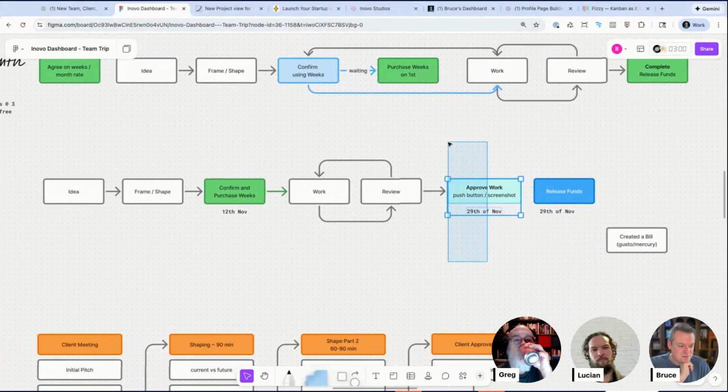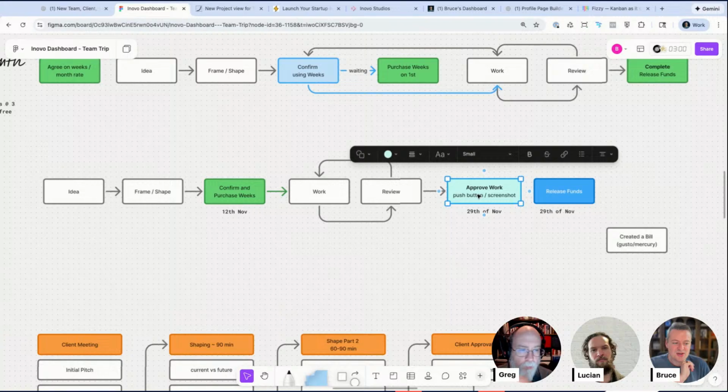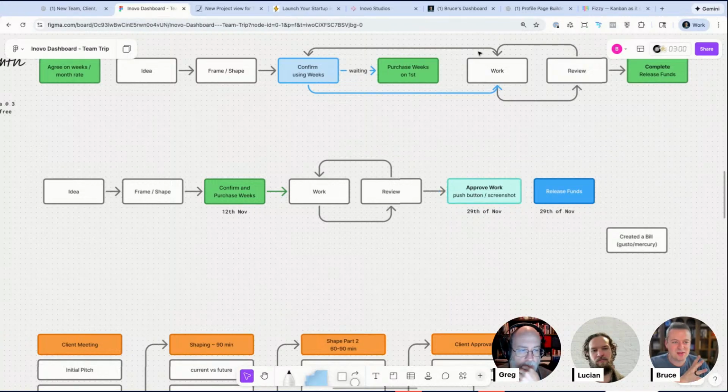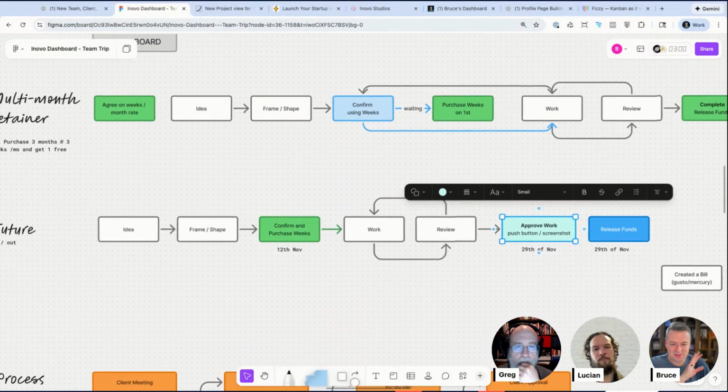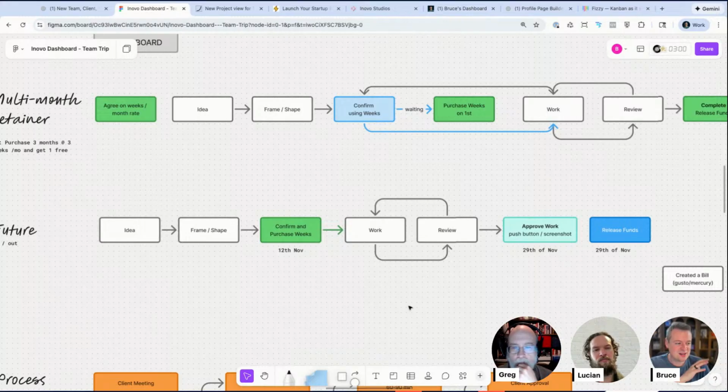This all came because we had this column called In Review that we didn't know what it was for. But when we said the clients are the only ones that can move it out of In Review to complete, there was a clarity moment: we're not allowed to move it out of In Review unless we're on a call with a client and they say yes, then we move it together, and we still leave a comment saying such and such client approved this. That's how we should get things out of In Review.